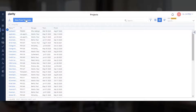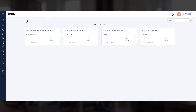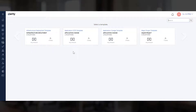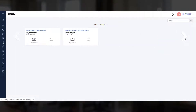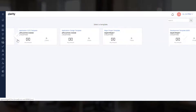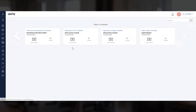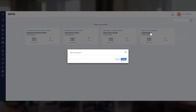Let us click New from Template to create a project from a template. You can select your template from a host of options provided here. In this scenario, you can see templates for Infrastructure Deployment, Application Change, and Major Projects. Let us select the Major Project template and create a new project.